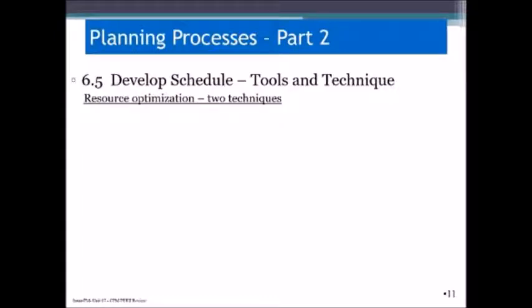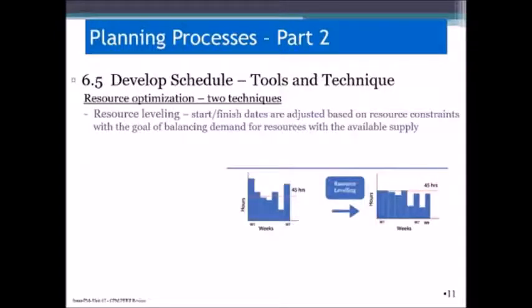Next tool and technique is resource optimization, and there are two techniques I wish to bring to your attention. Starting with resource leveling, think of resource leveling as a way in which we can adjust the start and finish dates based on the resource constraints. An example of this could be that we do not want our staff to exceed 8 hours per day with respect to their work, and therefore under resource leveling, we will actually extend the schedule. And note, in this case, we've extended the schedule by 2 weeks, from week 7 to week 9.